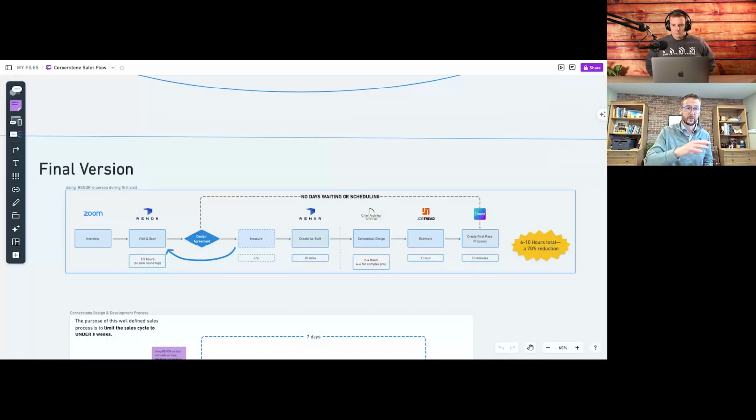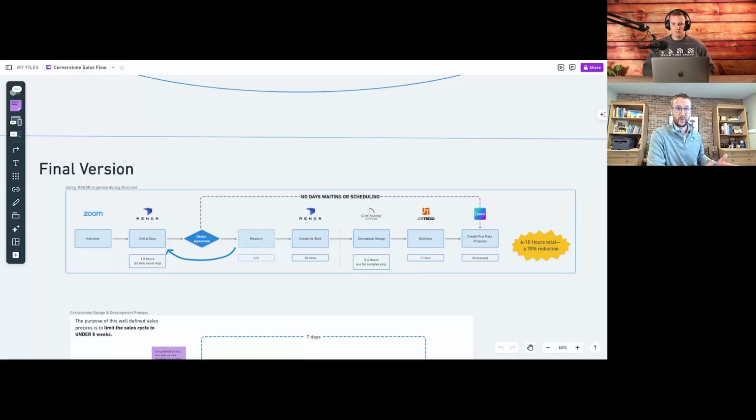We're going to probably outfit you with all Kohler Delta fixtures. And at that point, they're all allowances, so you've got $1,500 for your shower fixtures, whether it's the 3-way and the handheld and so on. We're not putting $8,000 in, right? So we know within reason about what they're going to spend in all these different selections. The hardest ones to nail down are, unfortunately, the bigger ones: the cabinets, countertops, a tile for a bathroom.